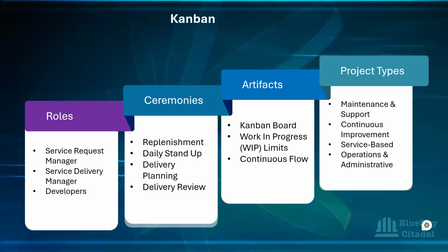Is everything in place? Are the environments ready for it? The comms, have they been sent out? Everything they need to do. That is them planning how the delivery is going to be, the things that are going to be delivered. Are they ready? Coordinating with the customers, coordinating with the stakeholders. How do you want to launch this to your customer? They start working with the operation teams to make sure that the release goes as smoothly as it should be.